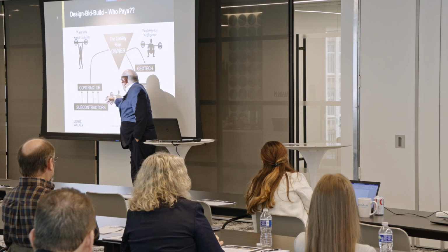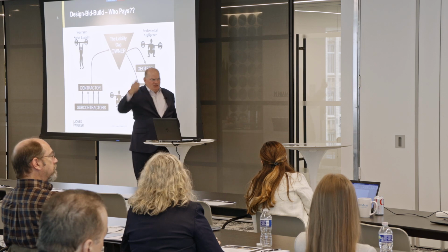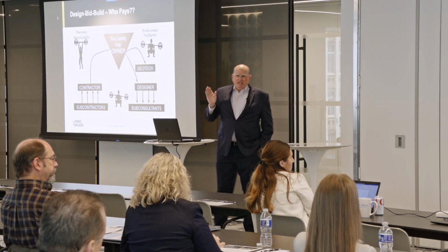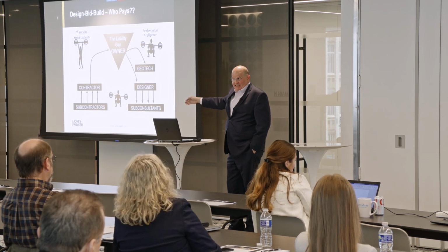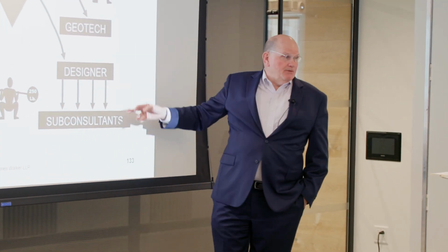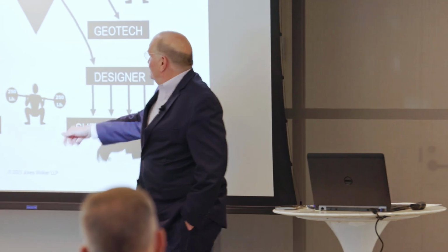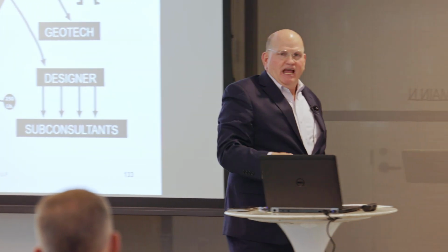And then here, I forgot to put the arrow in, there is, of course, in theory, the potential that the contractor can either come directly at the designer under a professional negligence standard, or the subcontractors could potentially come across. And if you're doing that as opposed to going this way, then you're back to that very heavy burden of establishing professional negligence: defect, what the standard of care is, whether the standard was met, damages.